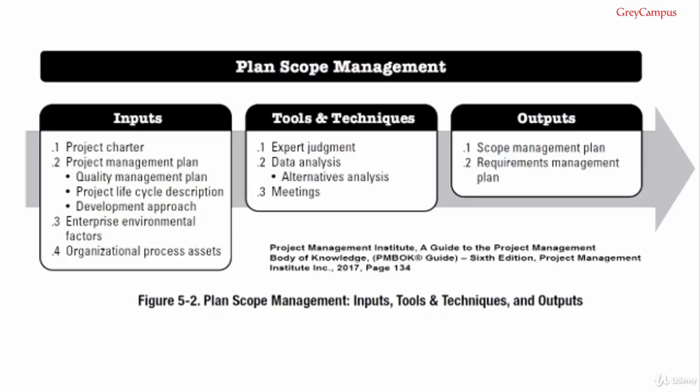Number 2, data analysis. An alternatives analysis technique is valuable here. The time that you have the most control over a project and the time you can make changes for the least cost are both at the start of the project. Methods that you choose early can have a big impact on the outcomes, so you need to get it right now, because any bad choices in the early stage will come back to bite you later on.